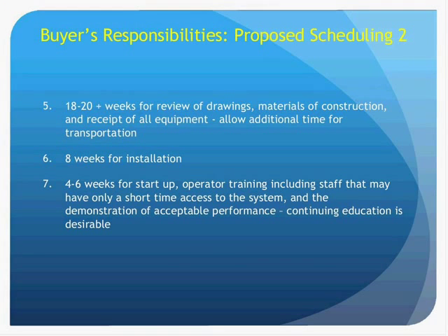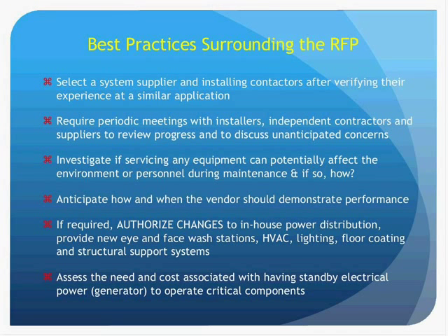Following that, it may take 8 weeks to complete the installation. Following that, allow 4 to 6 weeks after the installation to bring the equipment online, conduct startup procedures, provide operator training, and to demonstrate acceptable performance to the end user. Next slide, please.